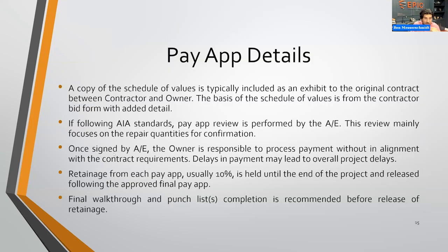As I stated, once signed by the AE, it's the owner's responsibility to deliver the payment. Delays in payment may lead to an overall project delay. That's not a spot you want to be in. The contractor will start hitting with delays, and they just start building up that record. Not only does it move out the actual finish line, but there may come some penalties along the way. Hopefully, with good communication, those can all be avoided.